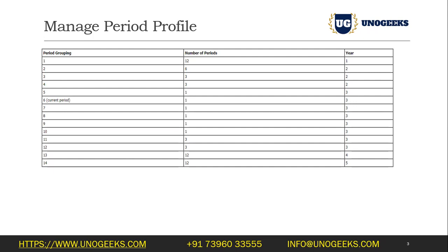But for the cost part, it's not like that. It takes your expenditure items into consideration, and your expenditure items can be burdened or can be raw cost. So if you are using a cost-based invoice or billing method, then your burdening will come into the picture. In fact, if you do the work method also, there also your burdening can come into the picture. But event is a very simple thing, you just create an event and an amount. There is no concept of costing, no concept of burdening included. So it is a very vanilla method of doing the invoicing.